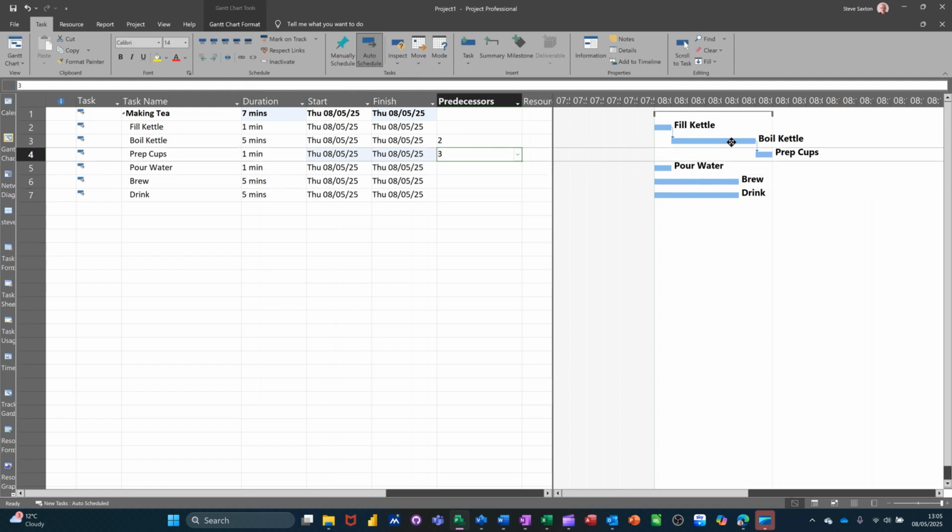Now I could put a bit of a lead time on that. So if I go 3 FS, finish to start, you have to put that in there when you're doing a lead time, minus 4M, let's see what that looks like. Comes back like that, but I don't really like it looking like that, so I'm going to do it like this.